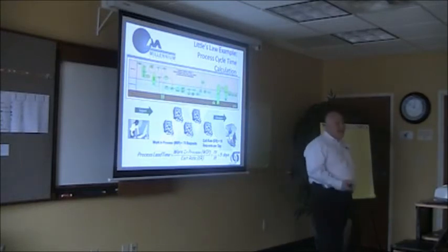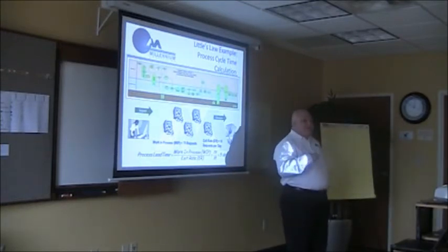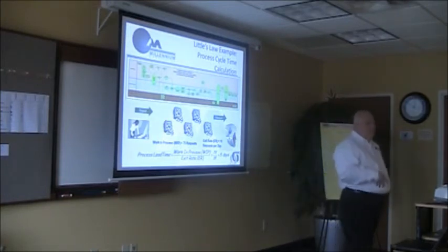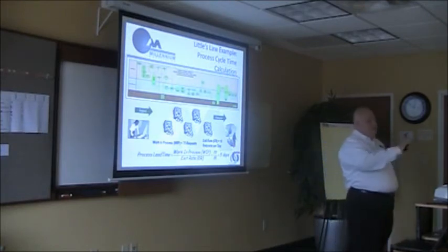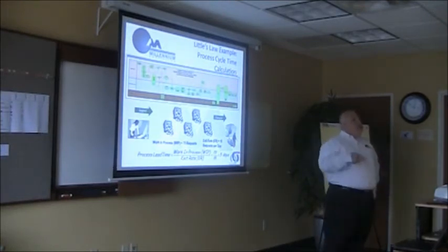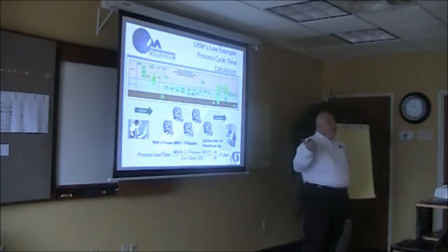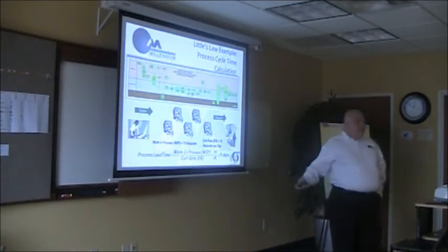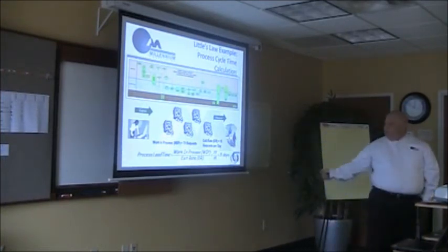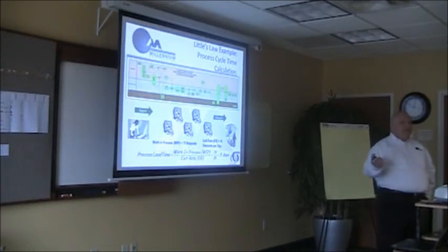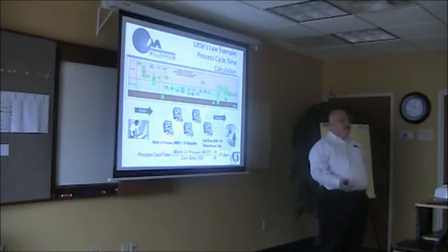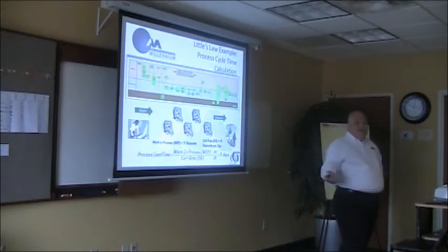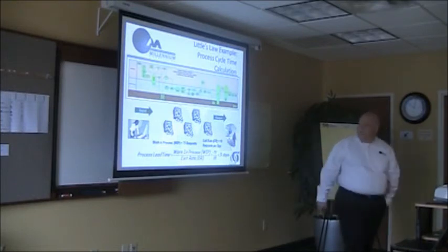So if they said, and I use the blue paper, yellow paper example a lot, although we don't do anything on blue or yellow paper. But if they said, yeah, we want this to start coming in on pink paper now, right? Without doing a lot of expediting, how long would it take for us to get through that change? Well, if this was a process and everything that's in WIP is coming out on yellow paper, it's going to be 5 days until they start seeing pink paper contracts. Does that matter? Maybe they're okay with that. Maybe they're not. How much rework we have to do, expedited rework, to go redo everything.